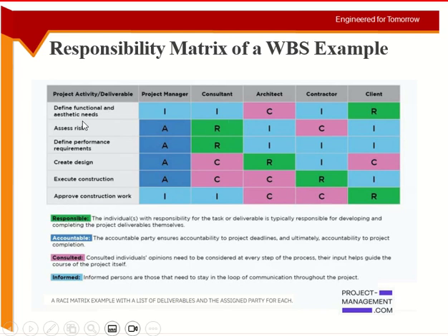Another thing which you can see in the first row, and I'm just explaining the first row for the sake of example: we have three roles. We have consultation, we have information, and we have the responsibility. There is nothing for accountability here, so nobody is supposed to take an approval for that. The client will discuss, he will finalize, and he will tell the others, these are my needs. So there is no accountability here.